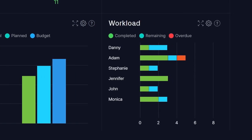The Workload panel shows each of your team members' workload broken down into completed, remaining, and overdue tasks, so you'll know whether your team has the capacity for new tasks and can decide the best way to distribute the work efficiently.